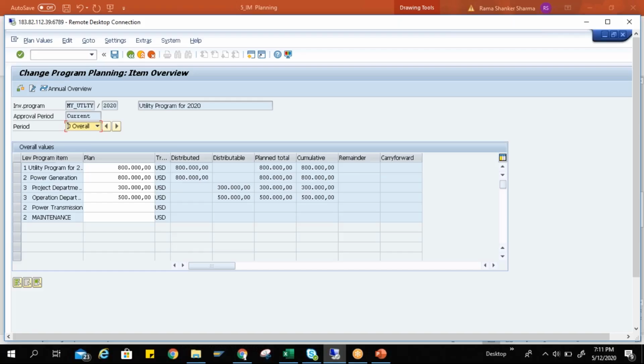I can have periods, years, along with overall values. For example, in this year I'll ask 10,000, next year 4,000, and third year 4,000. The remaining 20,000 gives me the flexibility to use in any year, so I can keep that 20,000 in overall. My year addition will become 10 plus 4 plus 4, 18. However, my total overall will become 20,000, whatever is accumulated from the years.